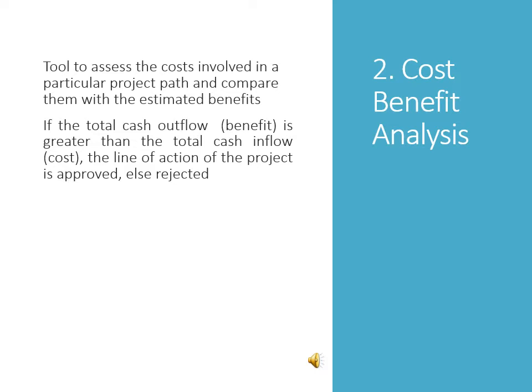Secondly, we have the cost-benefit analysis. It is a tool to assess the costs involved in a particular project path and compare them with the estimated benefits. If the total cash inflow, that is benefit, is greater than the total cash outflow, the cost, the line of action of the project is approved, or else it is rejected.